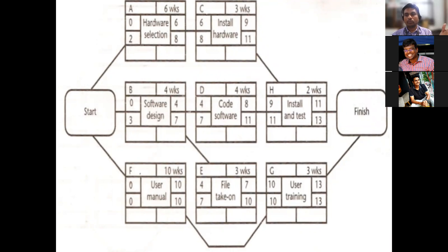So due to some constraints, maybe resource constraints or some other constraint, if it is happening in the project, and for some reason they want to delay it, if there is a possibility, with that float value they are able to identify it. If the float value is 0, then it clearly indicates that you cannot delay for any reason. You need to start and finish on time.